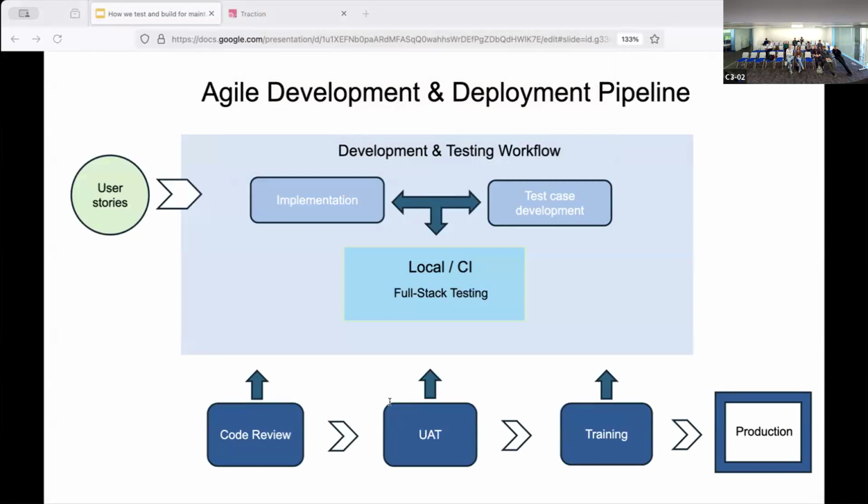So for our agile development, there are two types of work. There's user-led and developer-led, which is generally technical debt. For the user-led, a user will come to us with a new requirement. If it's more complex, we would meet with them to identify requirements and agree acceptance criteria. We would then write a story, estimate how much work it will be, and select a priority. And this would then go to our product owner.